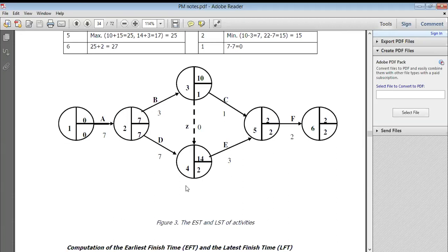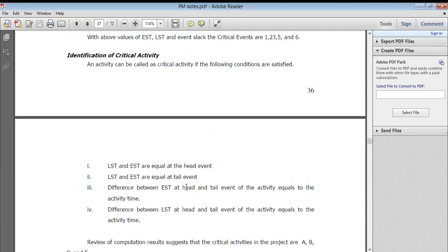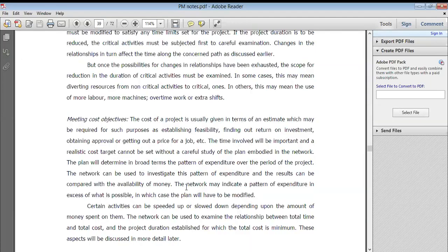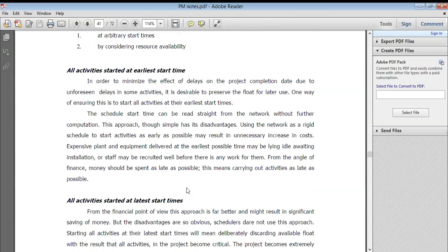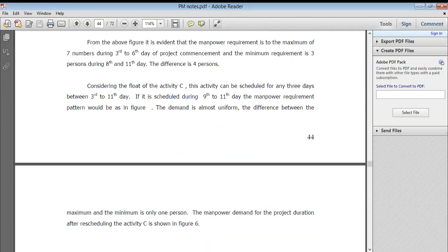On that basis you prepare a chart with the formulations, the time, the periods, the material cost, everything, and on that basis you prepare the network, meaning the critical path network. You mention the earliest time and latest start time, and you prepare the network diagram or critical path diagram, which shows whether your work is completed on time or not.